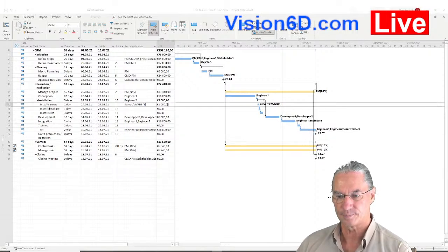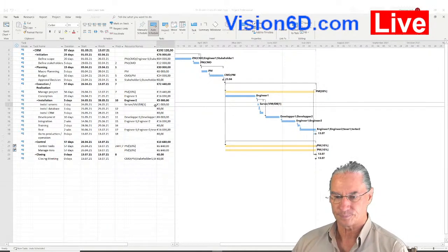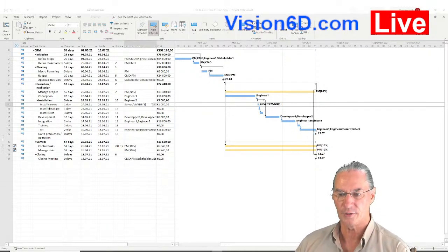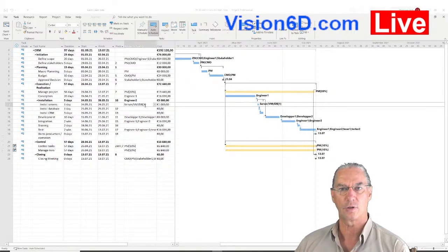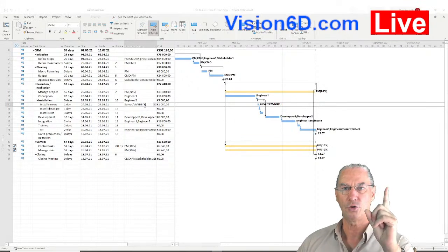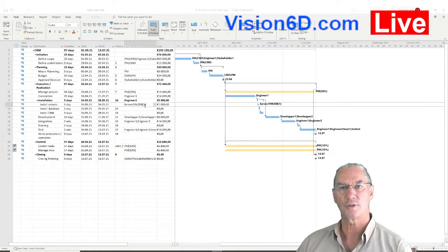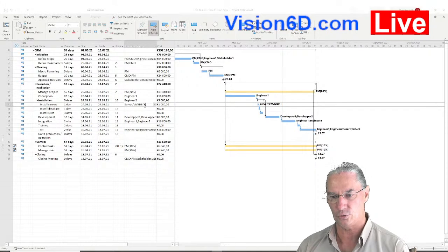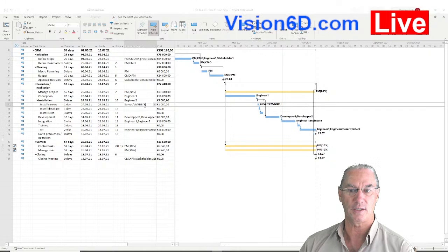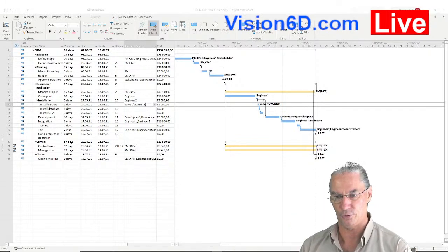You see that the cost here is 1,000, and you see also here between the square parentheses an indication of a single unit. MS Project, when you do it that way, decides that it's a single unit that you are going to use. So in our case, it's not exactly right, because we want to use 3 servers.